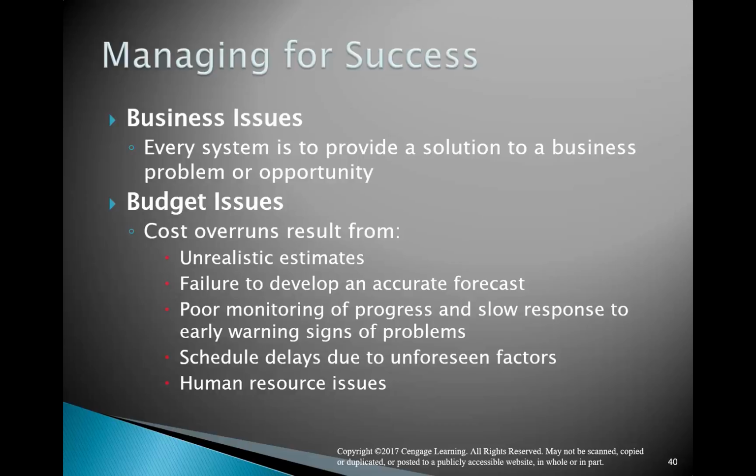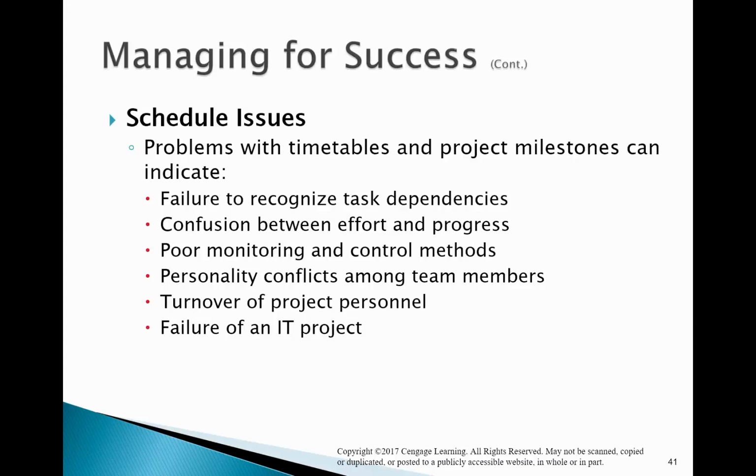Successful management is as good as the planning process and the looking at cost overruns. And again, here's where you'll put in a certain percentage that you'll have as an allowable cost overrun. There are companies, the larger they are, the more critical, and a small company may allow a 10% or 20% cost overrun. I promise you a large business will not. We're down in the points and tenths of a point for cost overrun. And if it gets to a certain point, you have to pull the plug on this. Companies can't continue to hemorrhage money. I see it again and again.